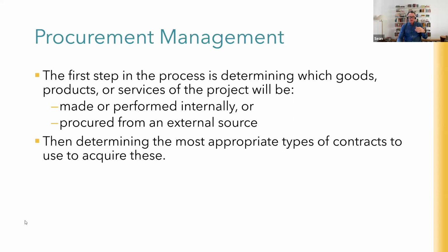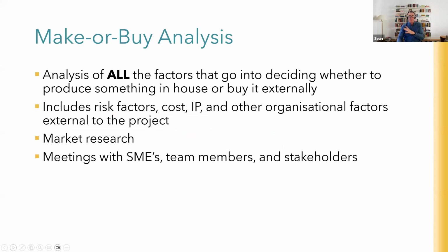And that very first step of making that first decision, whether you're going to do it yourself or get it outside the organization, is called a make or buy analysis. Now, for some decisions, it may be absolutely crystal clear that you just do not have the skills, the experience, the time, the resources, whatever, to make it or build it yourself. And then obviously it makes perfect sense to go out and procure those goods or services from somebody else.